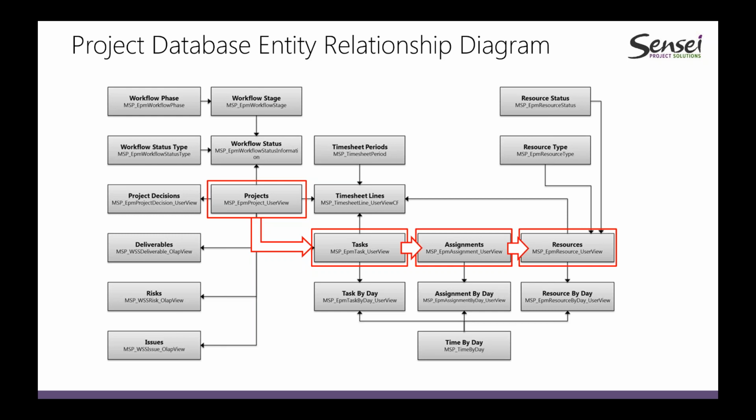And so it's important to know that there's this entity down below there. You could have 10 resources on a given task. That'd be a little bit hard to manage. Certainly the best practice is to have a single owner of every task, but the system supports being able to have multiple people on a task. When you assign multiple resources to a task, you're creating an assignment for each one. And those assignments then are layered down, and those assignments are actually what show up on people's timesheets.